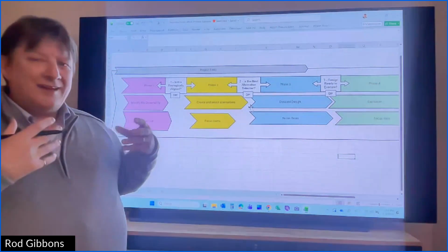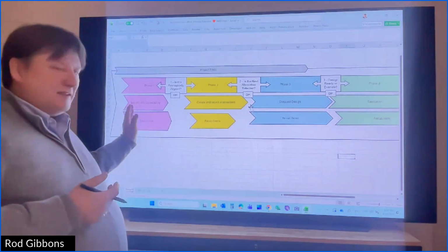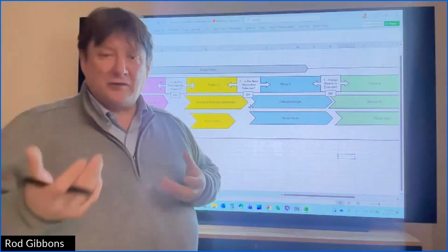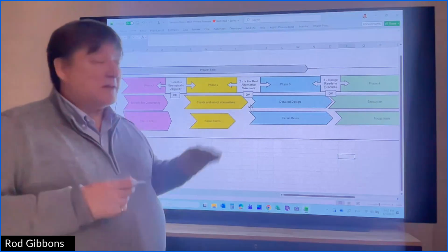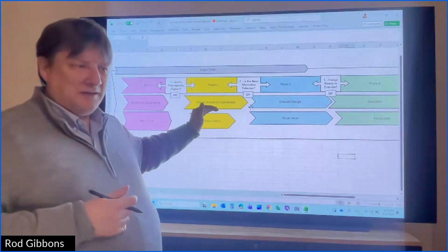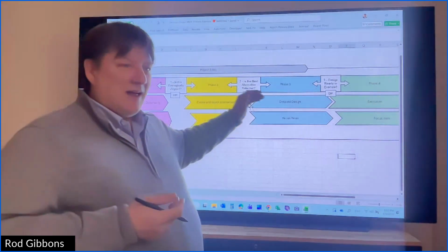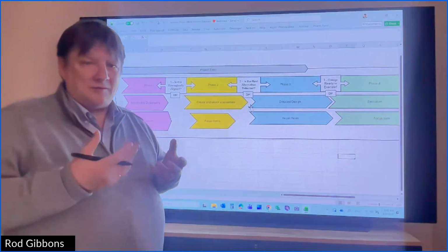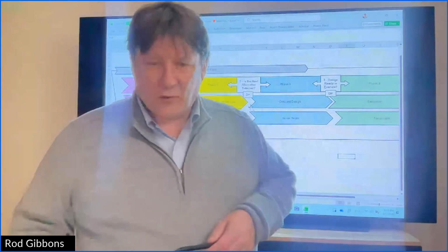So I talk about capital allocation, costs, and time, but risk can be treated exactly the same. If you can identify the risks early, and when you look at alternatives, how the different alternatives handle risk, that is, I think, the most value. Because if you execute a low risk project poorly, it's still low risk. If you execute a high risk project with excellence, it's still a high risk project. Sometimes it can't be avoided. We have to handle risk. The earlier we can start working it and thinking about it, the better the impact, for sure.